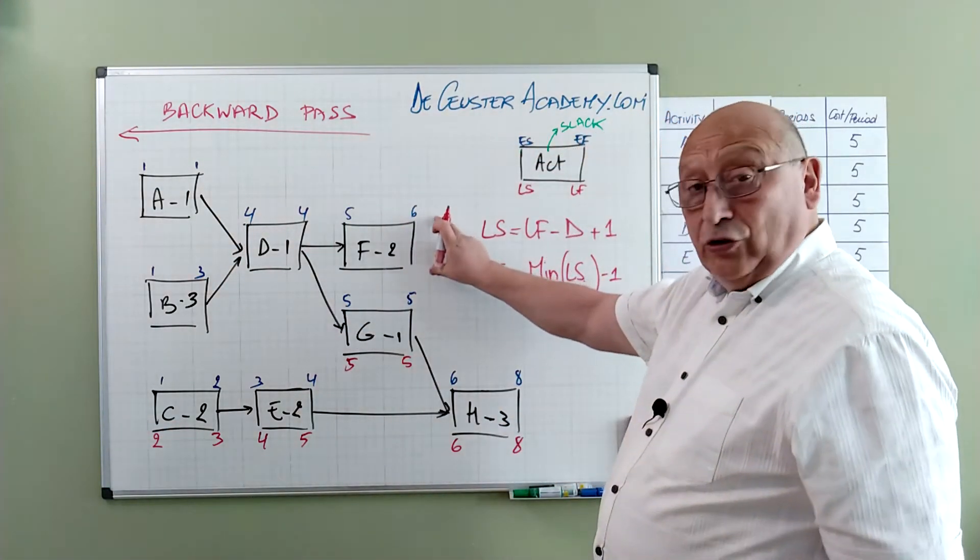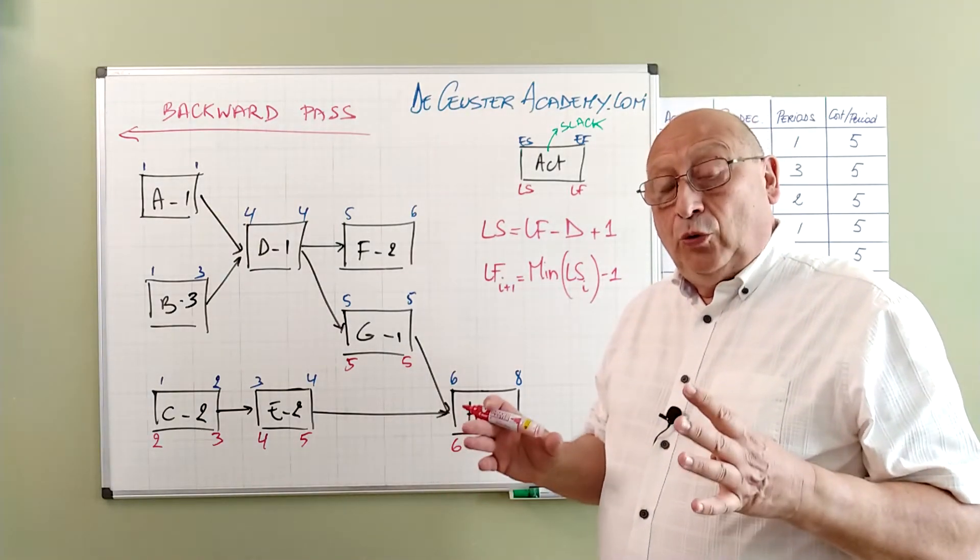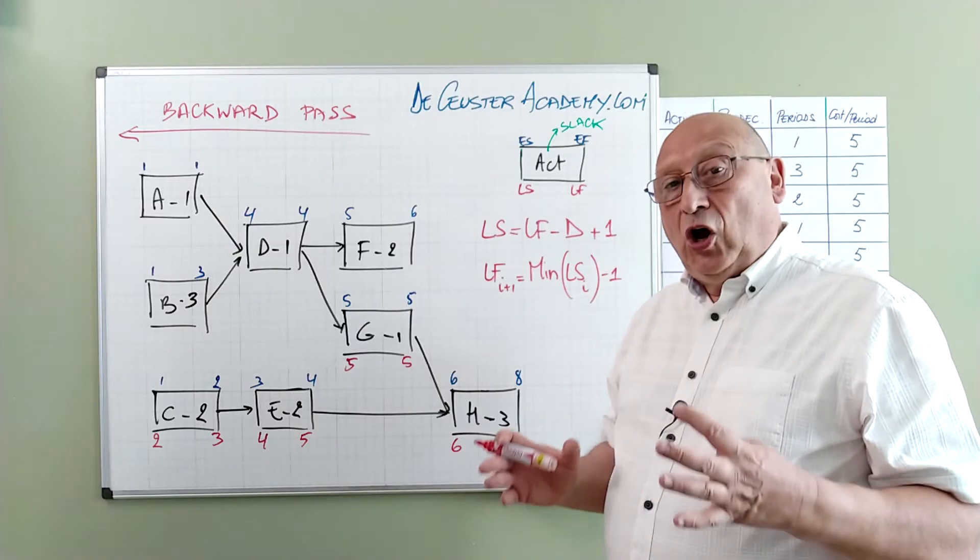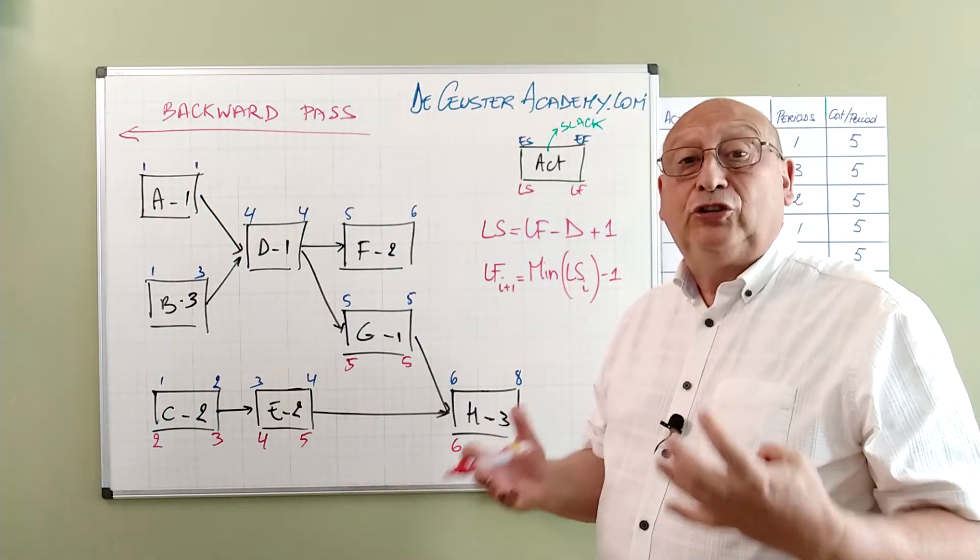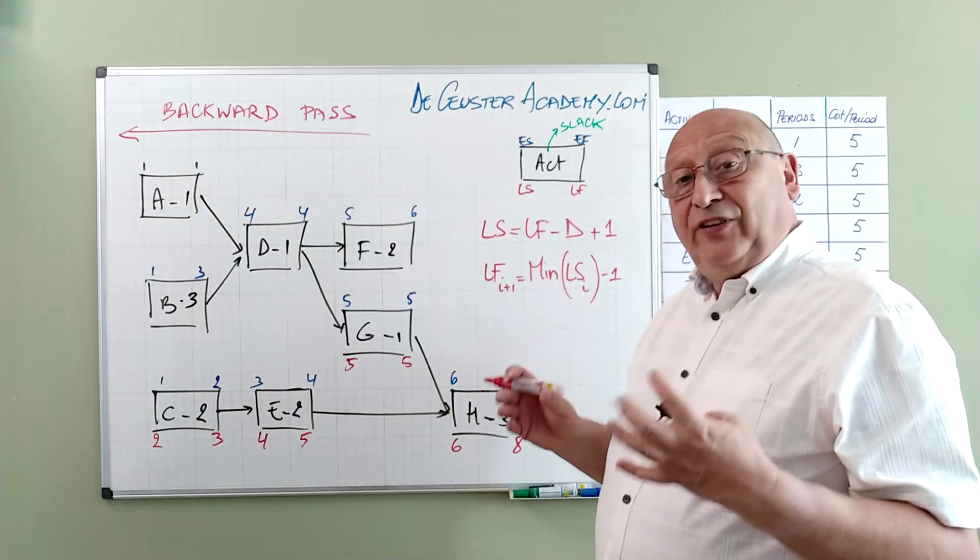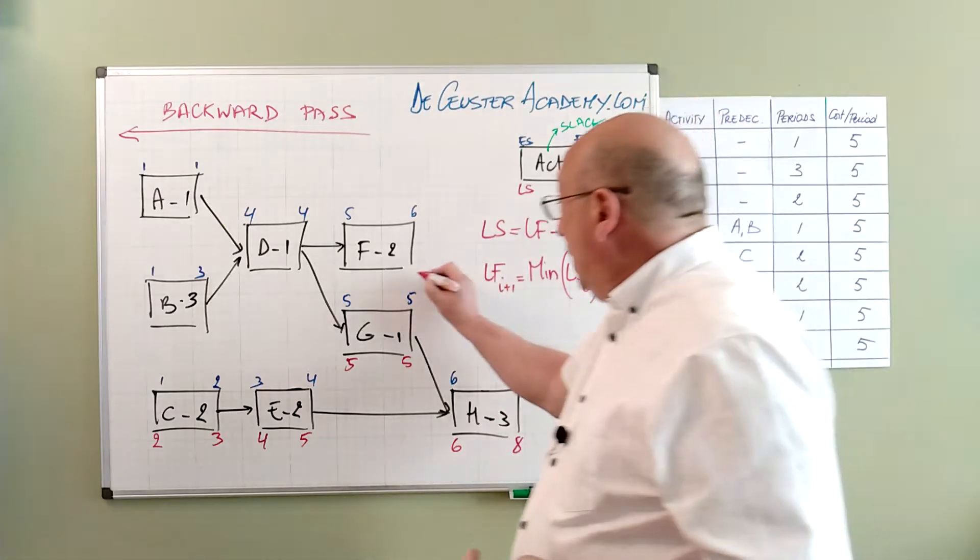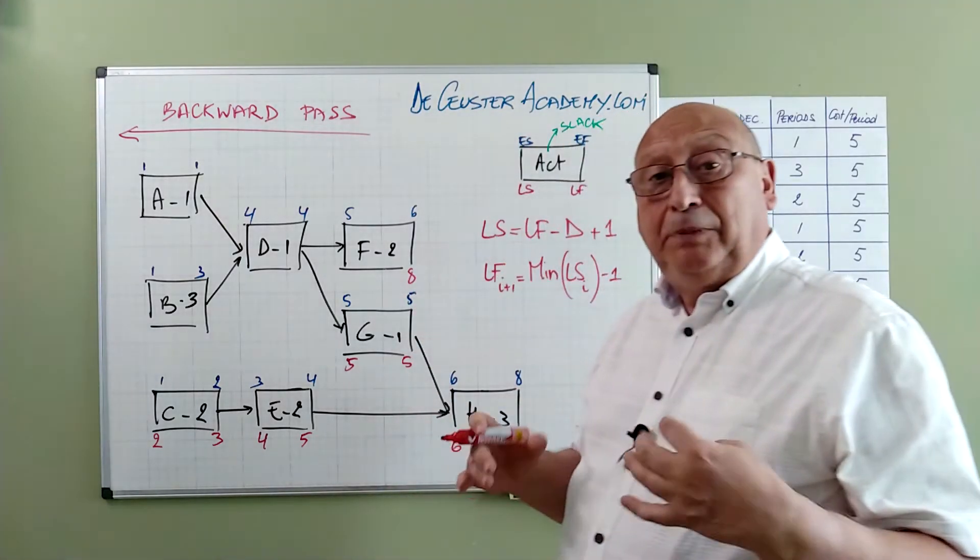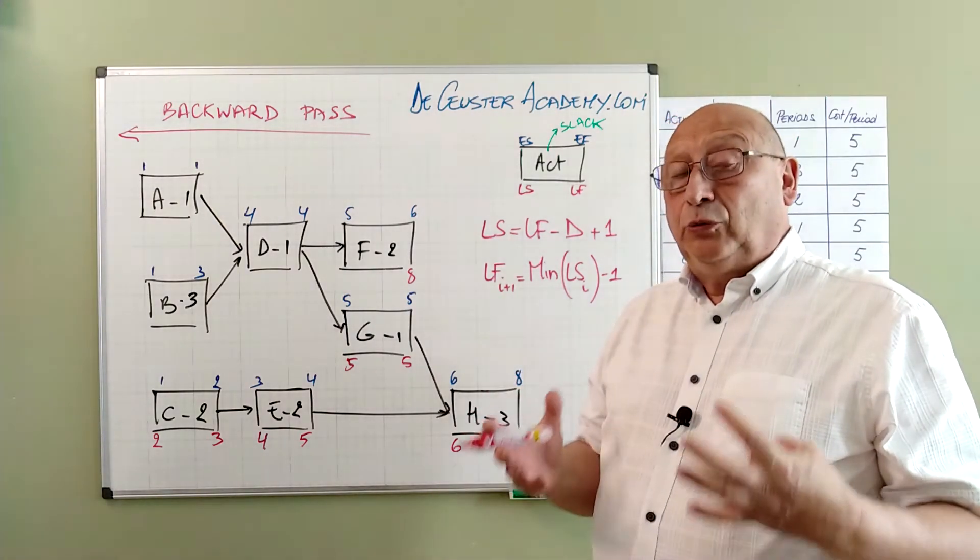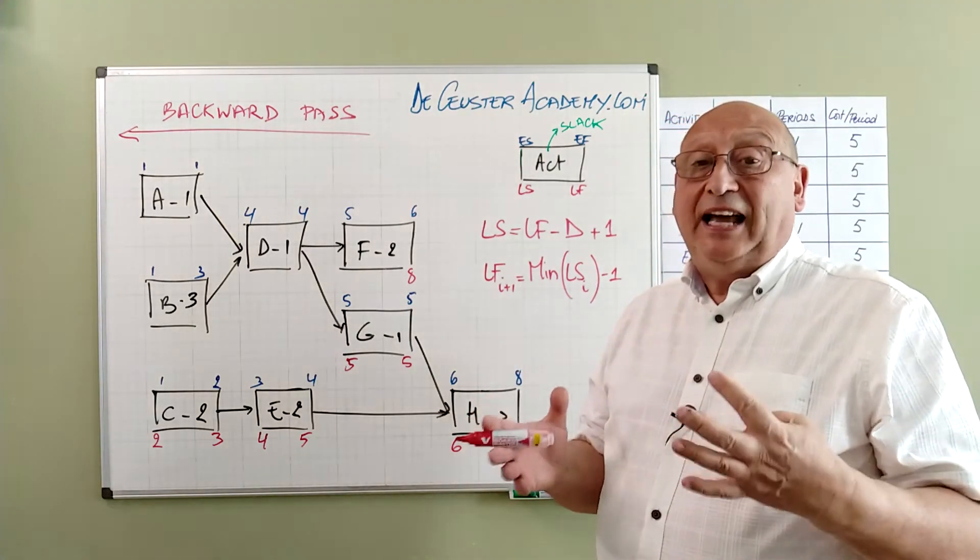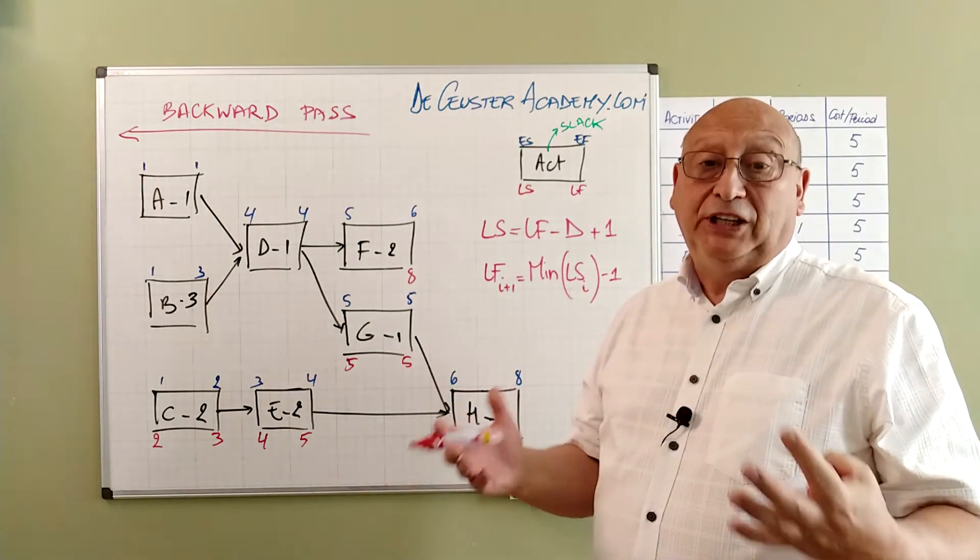Now we have to continue here with F. What is the late finish for F? We have to see the late finish of the project is the period or the time we have to start from. F can finish not later than this value. I see sometimes people writing here 6. That's not correct. We have to see what is the end date of the project. The end date of the project is period 8.